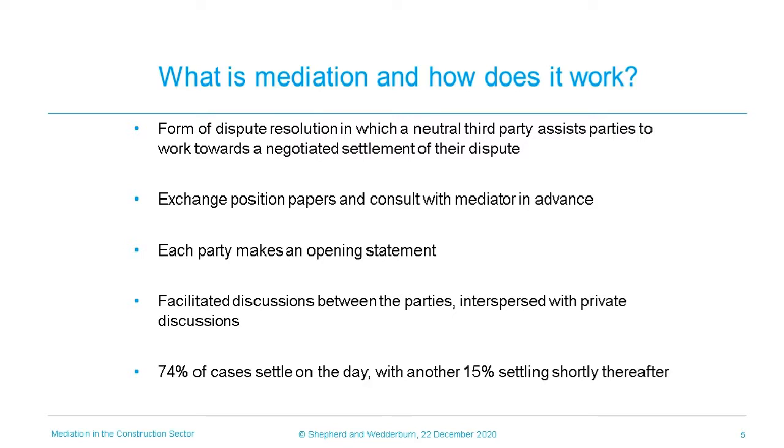In the current climate, this can be achieved virtually by the use of video conferencing technology, with breakout rooms used for private discussions. In advance of the mediation, parties will exchange position papers and documents and have a brief consultation with the mediator. This helps identify the key issues and ensures that the mediation stays focused on the essential aspects of the dispute.